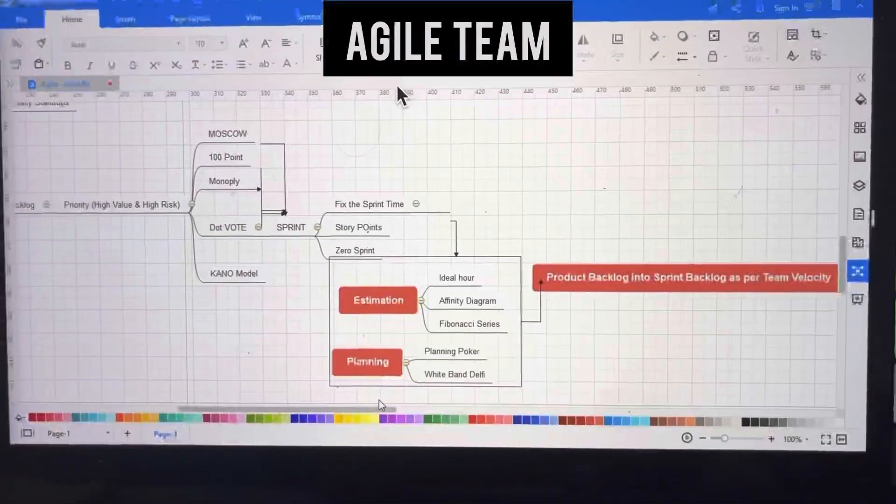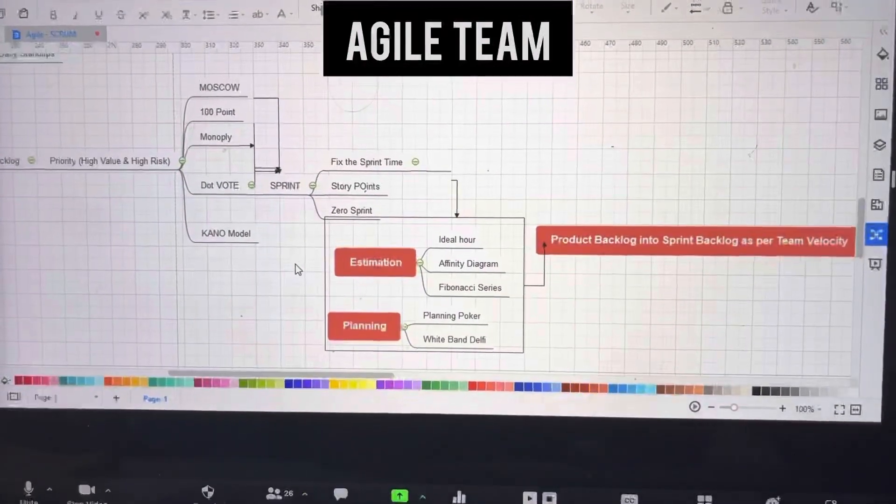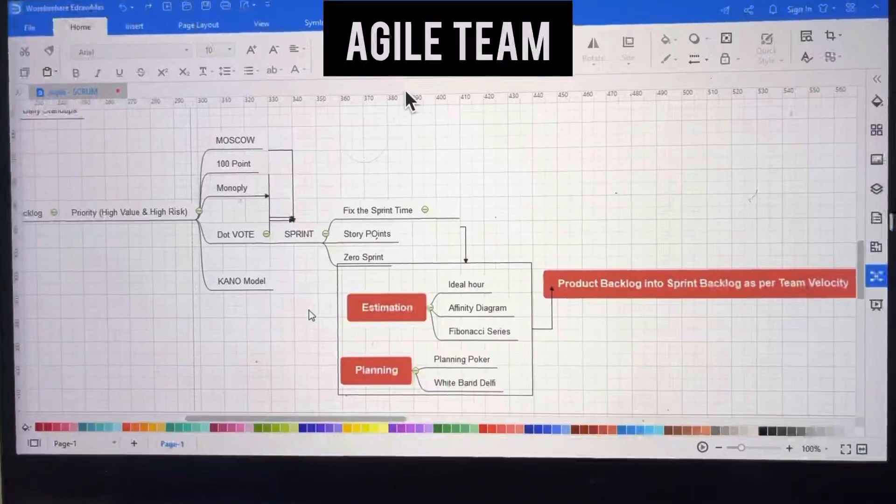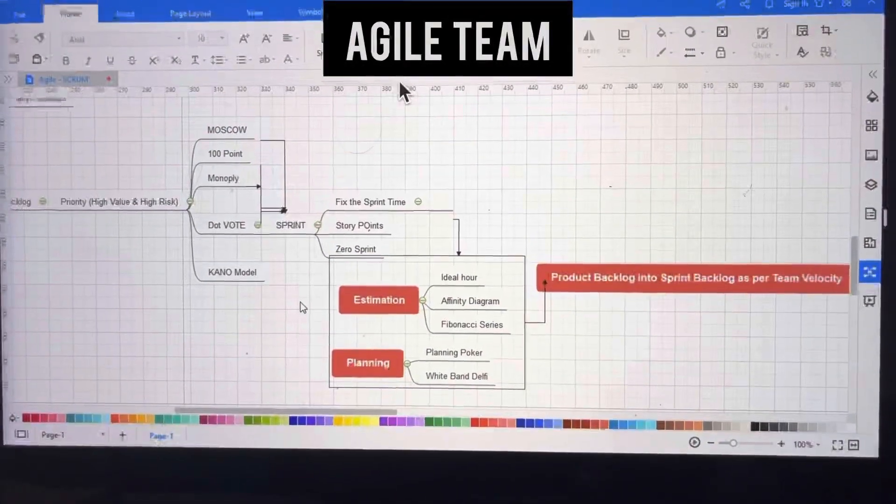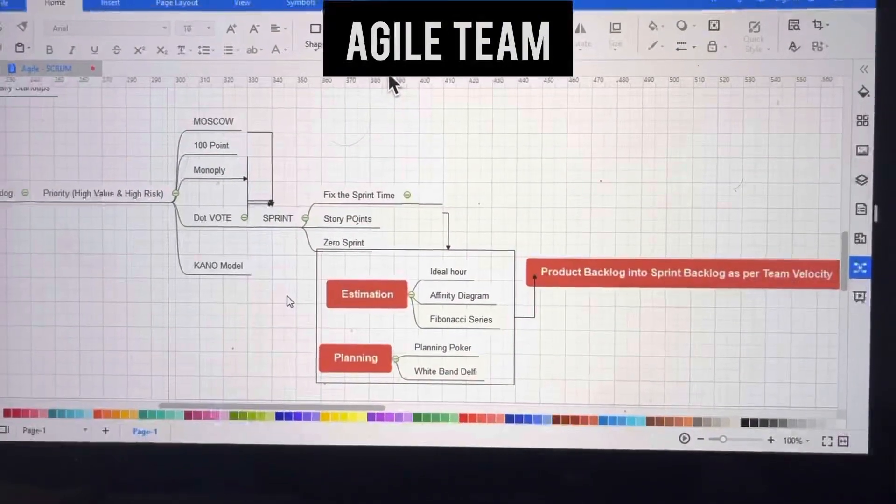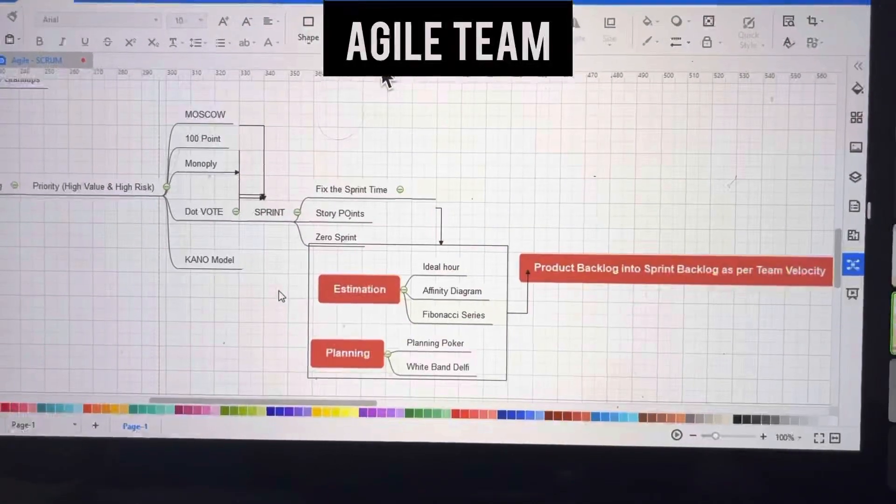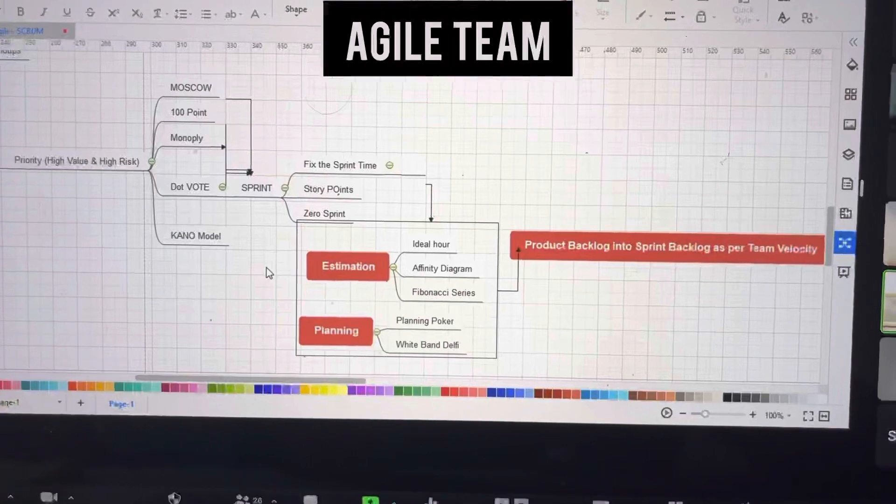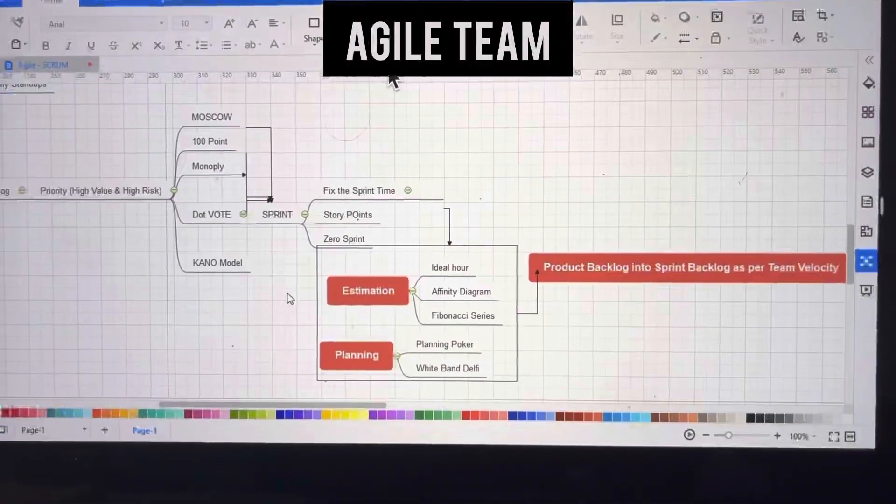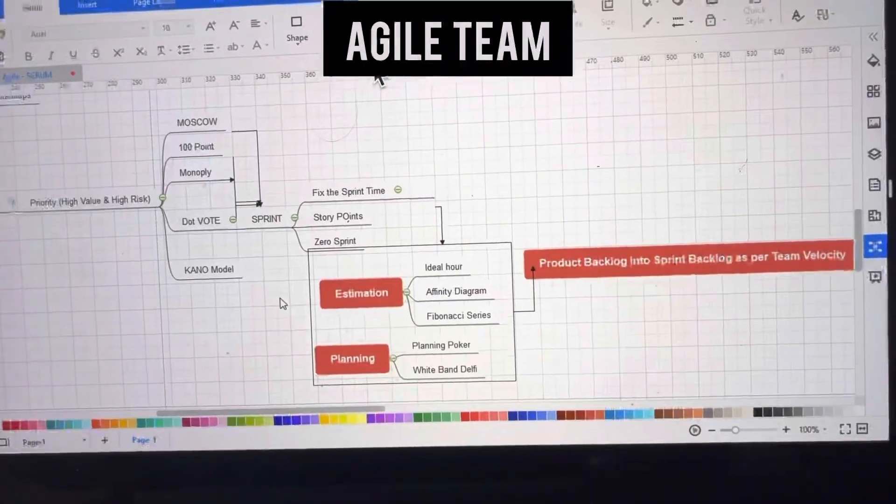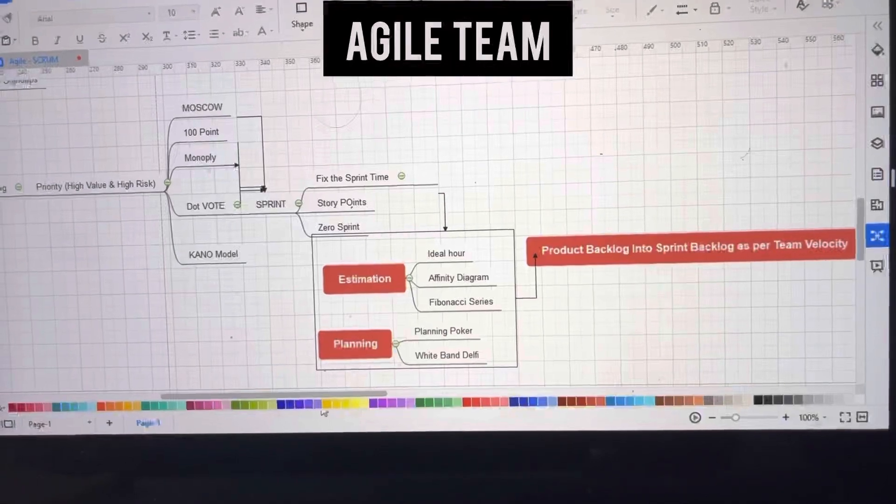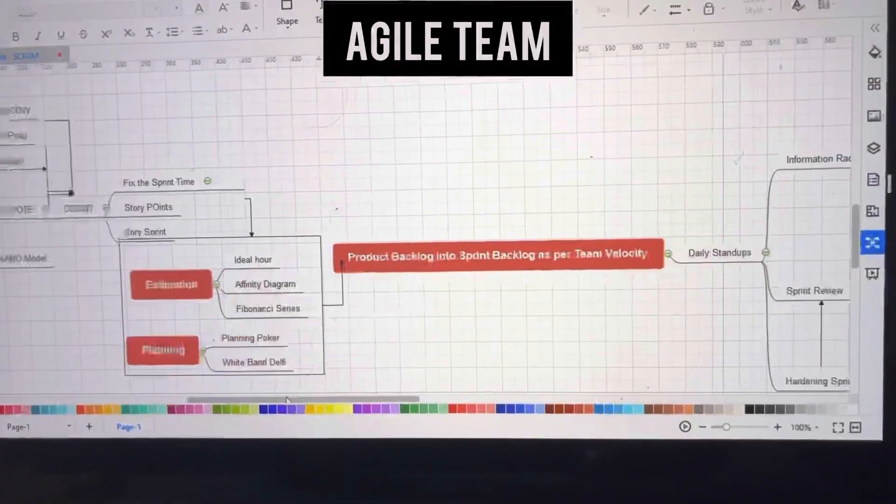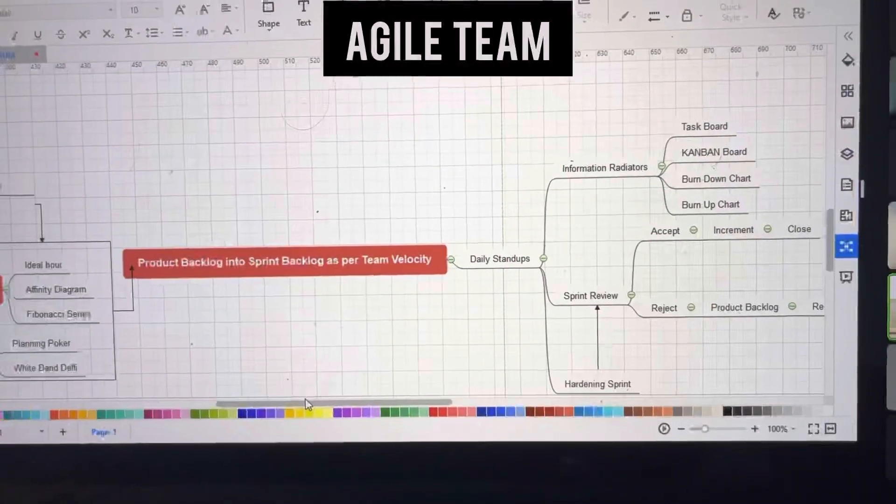After prioritization, we create the sprint and calculate story points based on effort. This happens at iteration zero of the sprint. There are three types of estimation: ideal hours, affinity diagram, and Fibonacci series. Time is calculated using two planning tools: planning poker and wideband Delphi.